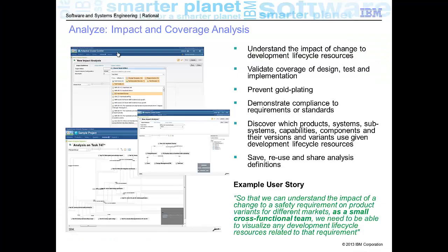The quality expert Philip Crosby said, "If anything is certain, it is that change is certain." This is especially true in today's complex systems. Requirements are continually changing and evolving. A change to a requirement may impact downstream systems design, hardware, and software development, and even finished products. If a company changes a supplier for a part, this may impact the upstream system's design and threaten the project's ability to meet a requirement.